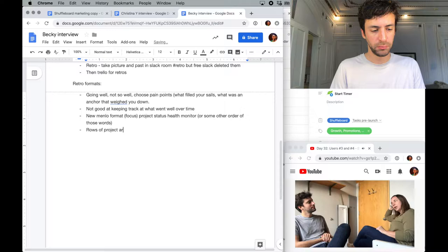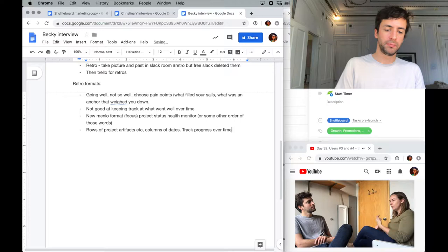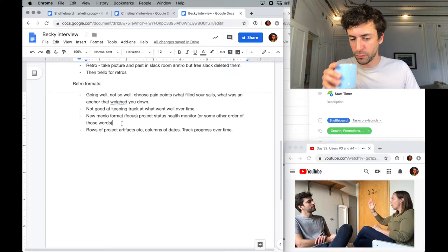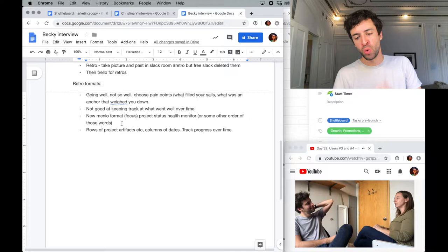So for instance, maybe one of the things is how is the team doing with communicating with the client or setting expectations with the client, let's pretend. Then the concept is you ask the team at a retrospective moment how we are doing with that thing. They give you a thumbs up or thumbs down, traffic lights, red, yellow, green. And you do that over time, and you watch if you're improving in certain areas, or hey, this is always red, what's going on.